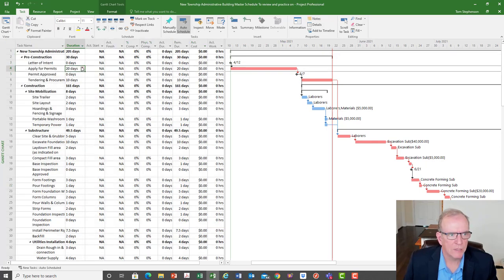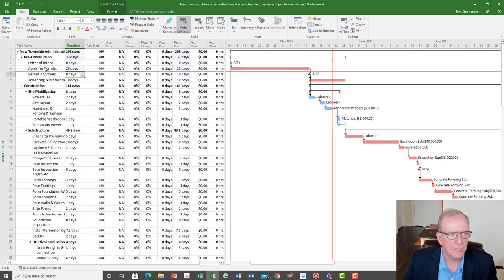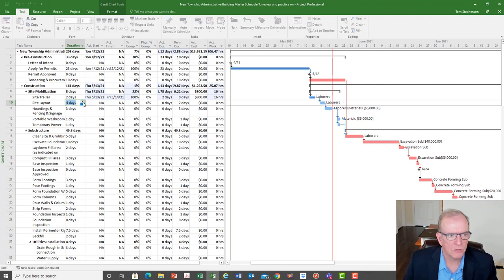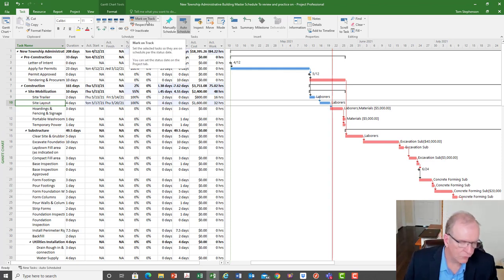I can say, you know what, this took 23 days. It's now done. I can say it's 100% done. I can say that the site trailer is completed. I could say that the site layout took an extra 2 days, so I could put 4 days, and I could say it's 100% done. And then, you know what? I could just update everything else on track. So that's where this mark on track is pretty useful.